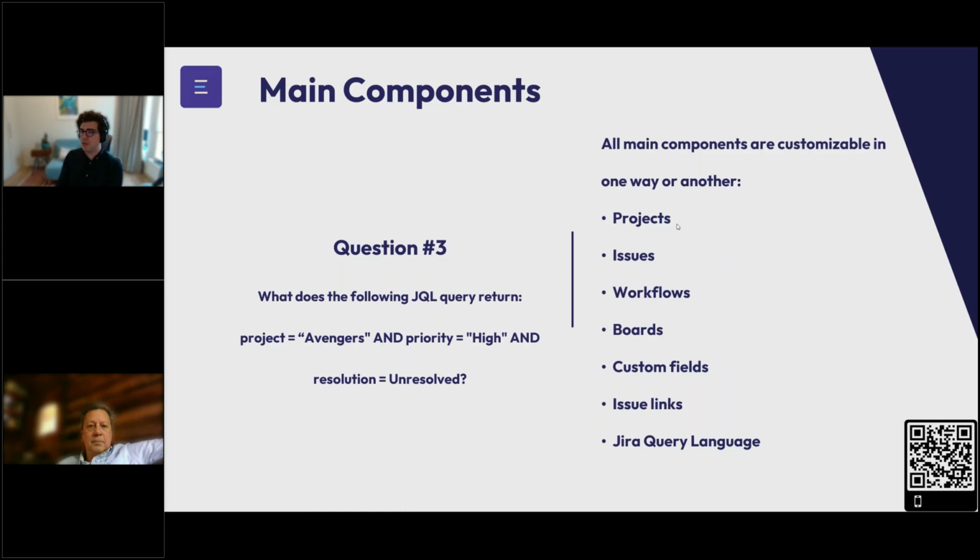Usually issues have a hierarchy, and you start with the smallest unit of work. It's called a subtask in Jira. I don't usually recommend it due to some specific details, but you can use subtasks. Then a subtask's parent is a task, a story, a defect, or bug. How I would describe it is a unit of work that can be resolved in a few days.